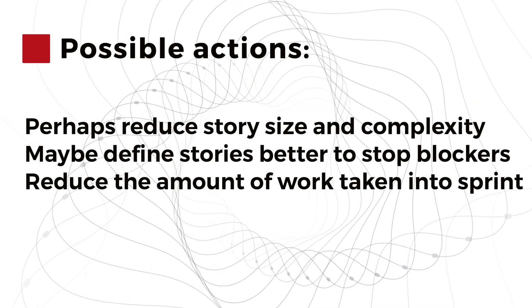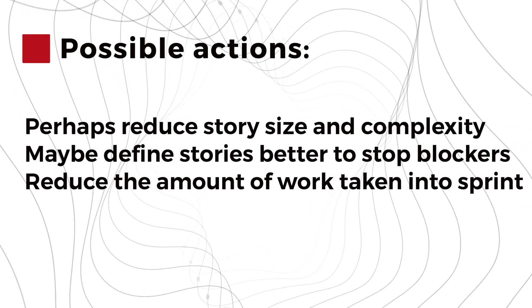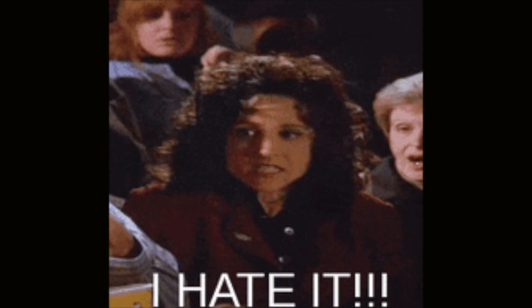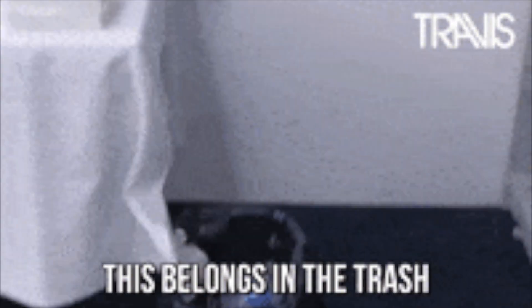This gives you insight into possible actions you might need to consider — such as perhaps your stories are generally too big or too complex, or perhaps they haven't been well-defined and you're hitting many blockers during the sprint, or maybe you're taking too much work into the sprint. In my experience, a good 85th percentile to aim for is five days or less if you're doing two-week sprints. The great thing about using percentiles is that it does not matter how big or small or how complex a story is — it simply doesn't matter. You can choose whatever probability you like, but 85% is my favourite because it gives a good balance. This is far more powerful than using story points and velocity, which is based on educated guesses. Developers hate estimating how long something will take — so this approach removes all of that and makes everyone's life easier. It just removes the rubbish part of saying something will take five story points, which has no value. Using cycle time and the 85th percentile takes out all the guesswork because it's based on fact.